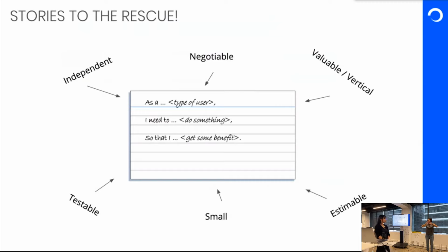Sorting, showing by relevance, showing the most popular ones on top, or putting discounts on certain products. Because look, Darren is looking for discounts and more deals and everything. So maybe on the homepage you show a section which says our most popular buys, right? Those can be all your stories. So you take one of the steps on the user journey and you break it into multiple stories.